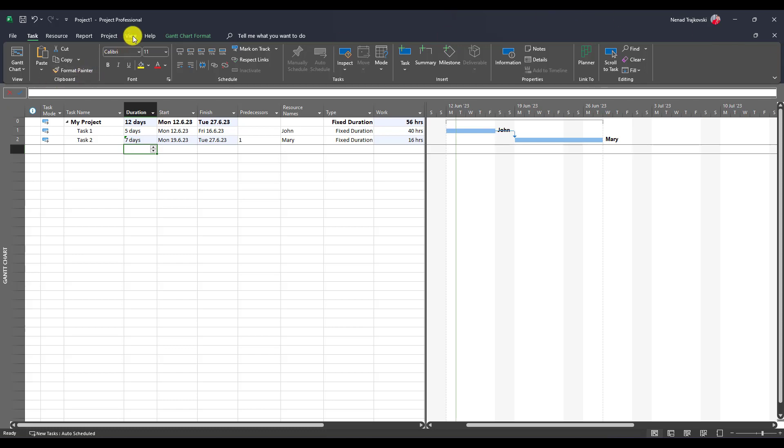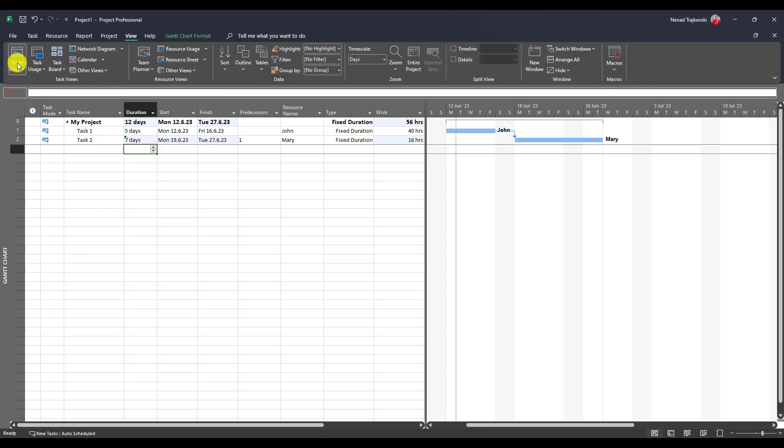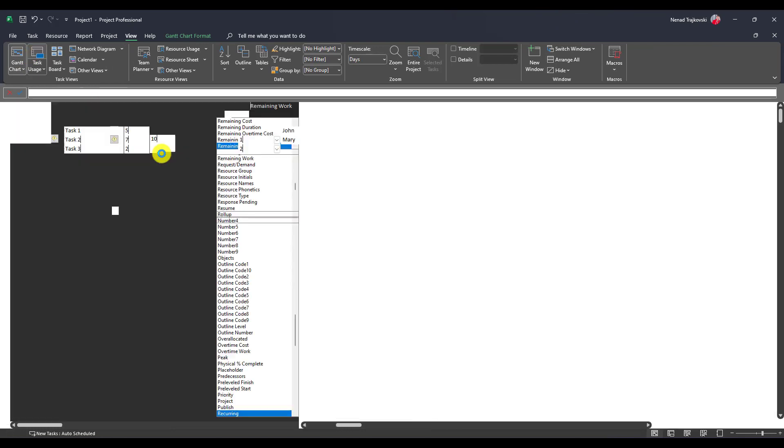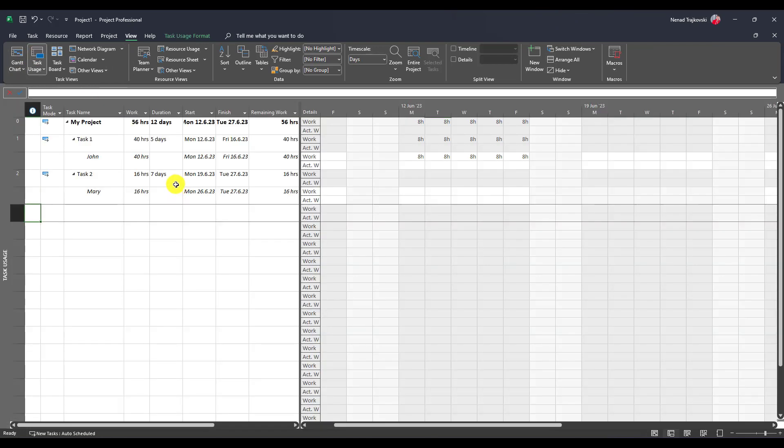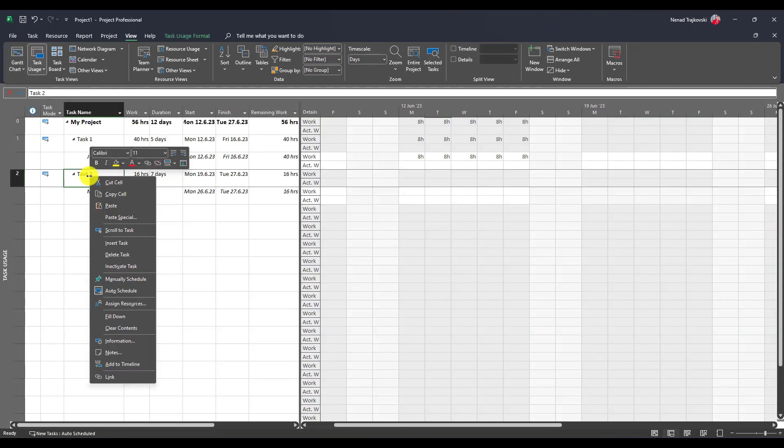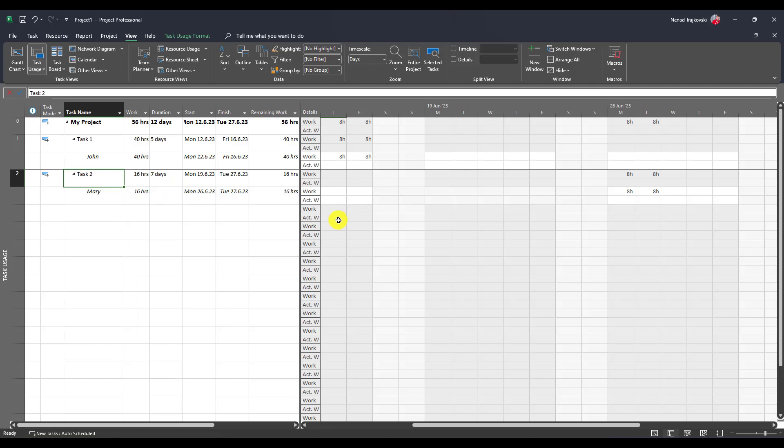If I go directly to task usage, I will see if I scroll to task, I will see that Mary is going to work Monday and Tuesday after she is back from her days off.